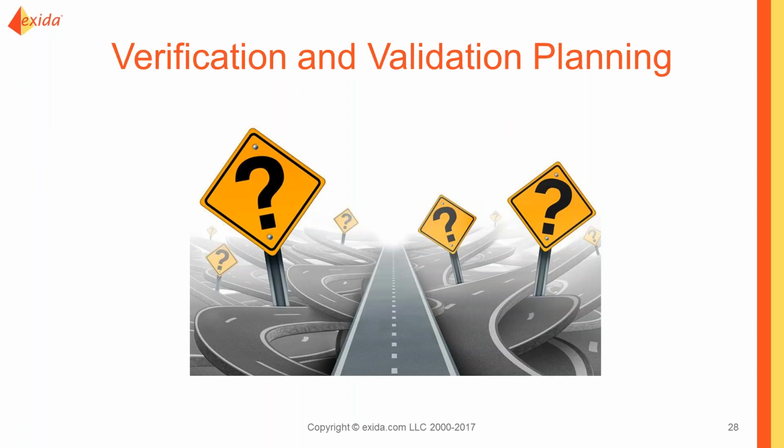With that thought process, or that pretty broad group of things to consider, it's important to take a moment then and do verification and validation planning. Because a little bit of time up front can help create a plan that when you get to your commissioning stage, you've collected a lot of evidence along the whole life cycle development or project, or delivery of that integrated or final element, that integrated valve assembly or other equipment.